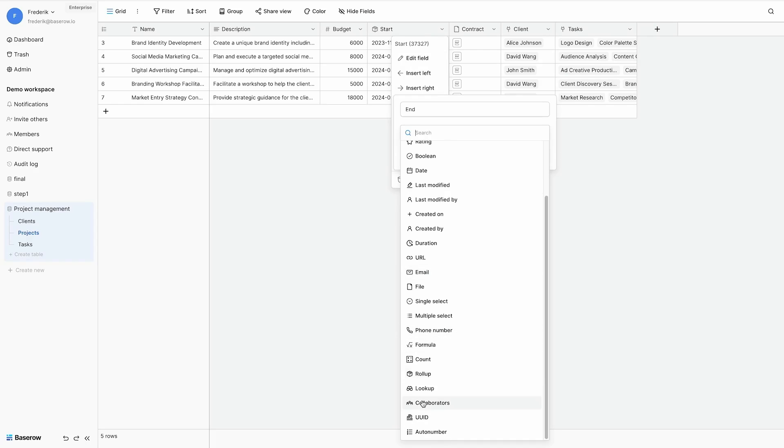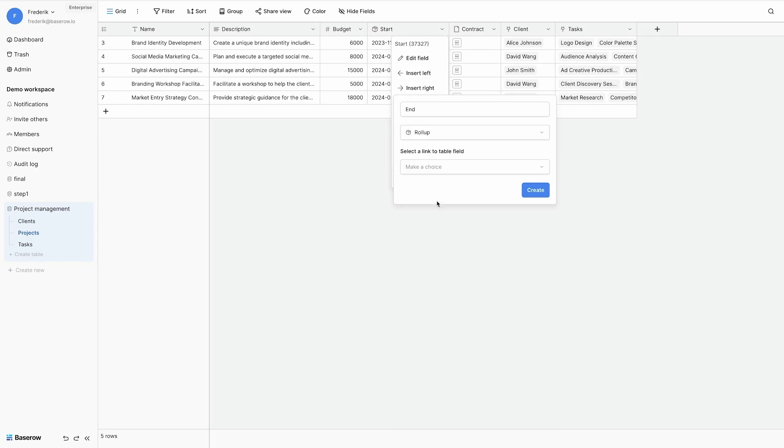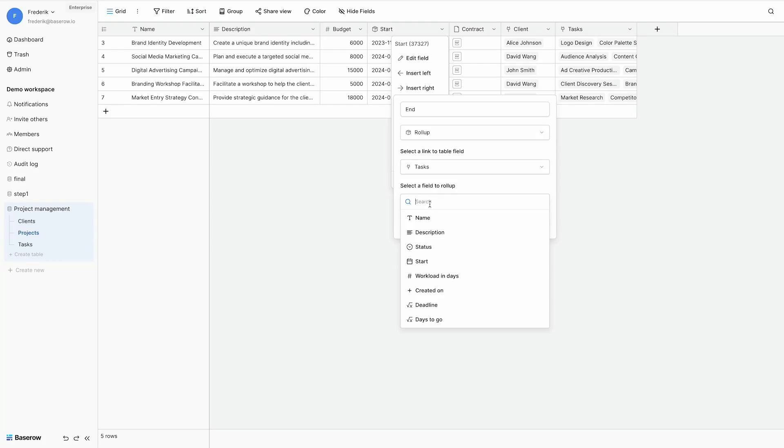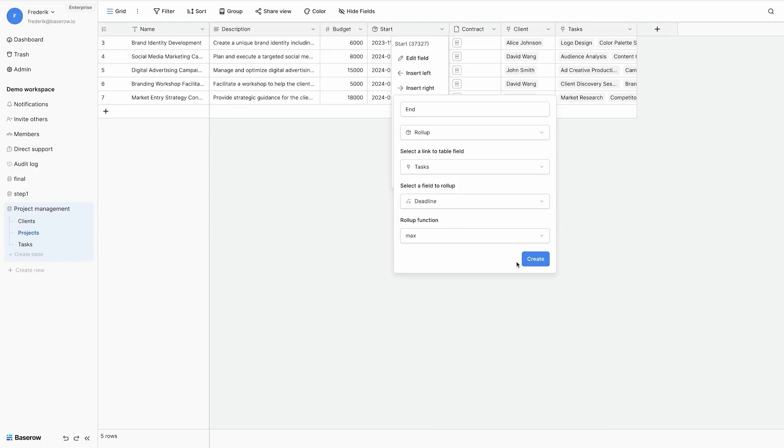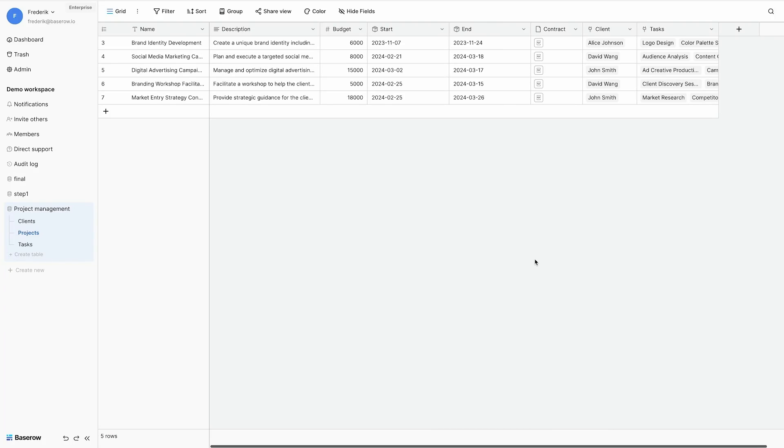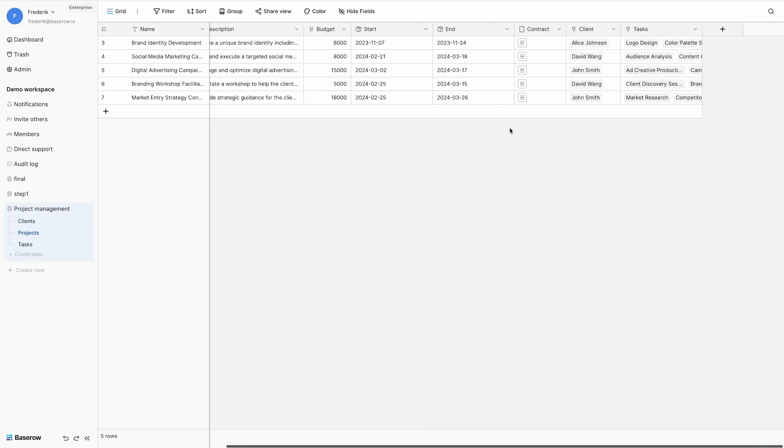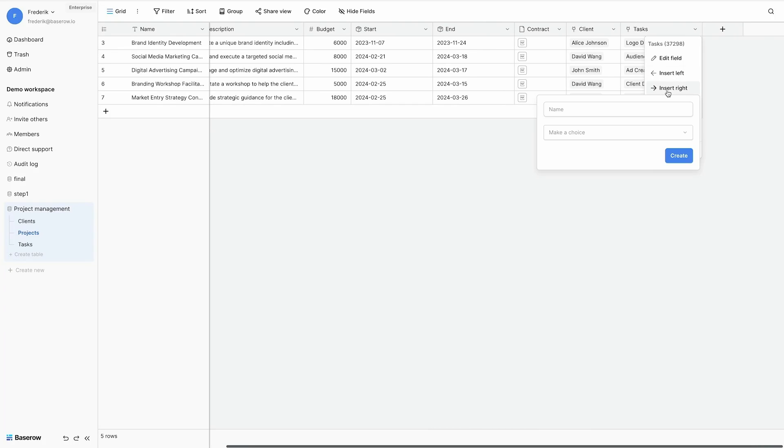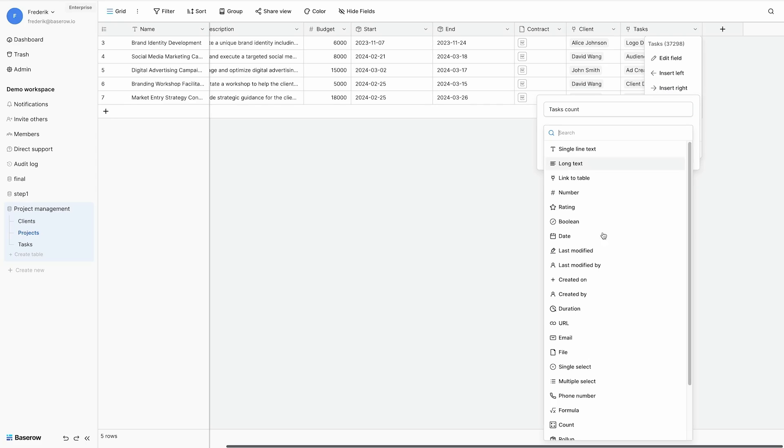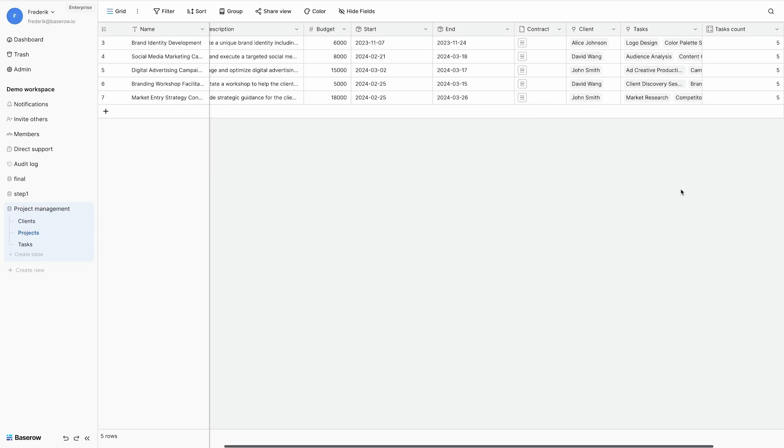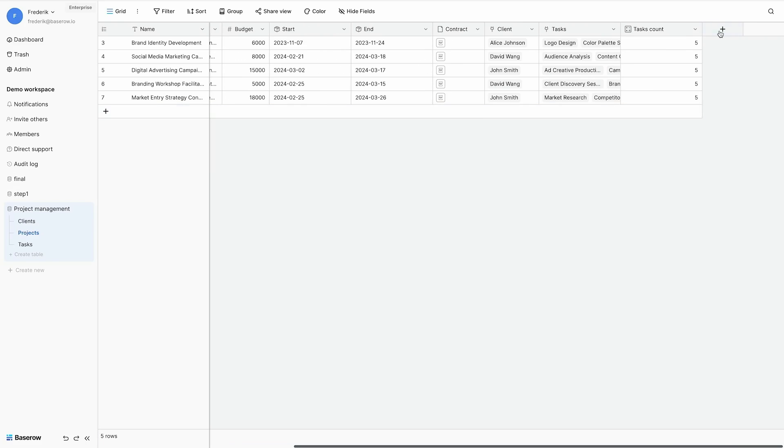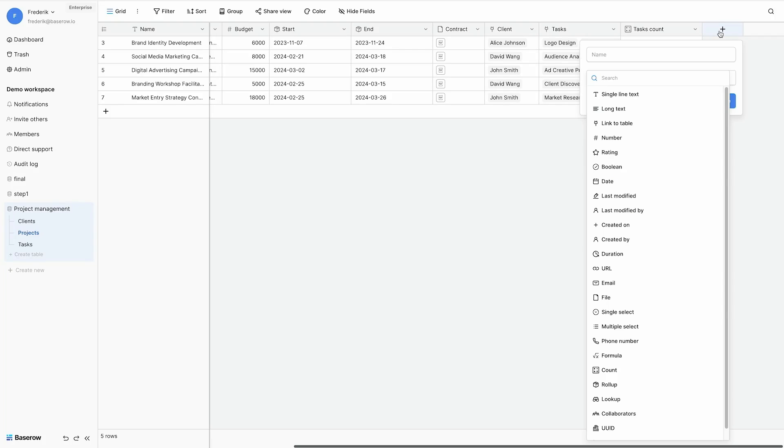And to calculate the end date of my project, again a rollup field to my tasks. And I take the deadline. But this time the maximum deadline. And this gives me the interval. I also want to count how many tasks there are for a project. So my task count is a count field to my task table. And each project has five tasks.